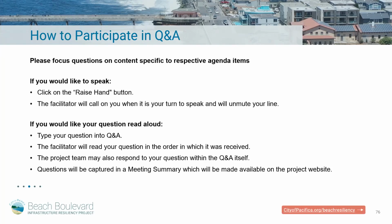Ideally, it will be at or before the release of the draft environmental impact report. We want to give them enough project description detail so that they can understand what's being proposed, while also giving them an idea of what the implications are from a coastal resource standpoint. And that's about the earliest stage that we can engage them meaningfully in terms of coastal resource impact for the permitting.